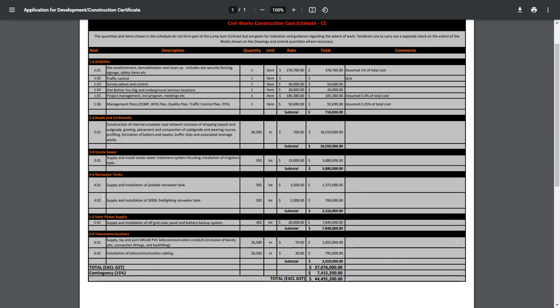They will provide their own on-site sewerage system, rainwater tanks, and solar power supply as they pick it out to go with the house that they would put there. The only thing that would be laid to the fence line is the telecommunications grid. So by my calculations, only $21 million could be justified legitimately as their development cost estimates, capital expenditure.